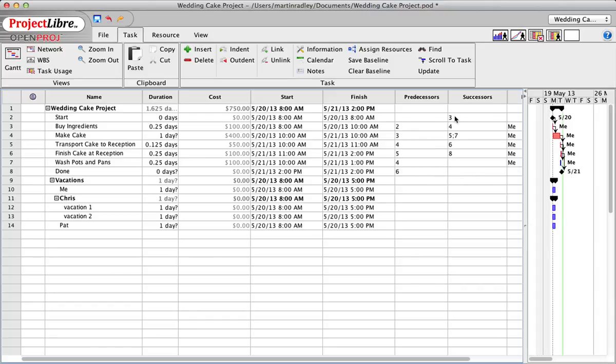In fact, every other task should have both: it should be associated with start or done, or have some other task before it. If any other task has a blank, you have a situation where you need to question, is this task really necessary?